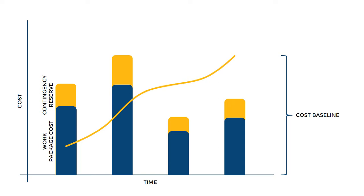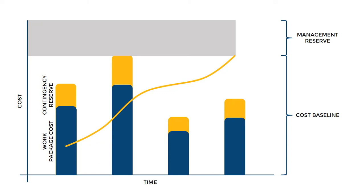As I mentioned earlier, the contingency reserves are allocated for the expected risks throughout the project's life cycle. What about the unexpected risks? Or in project management, we call it the unknown unknowns. In order to take necessary measures against the unexpected risks in the project, we have the management reserves.